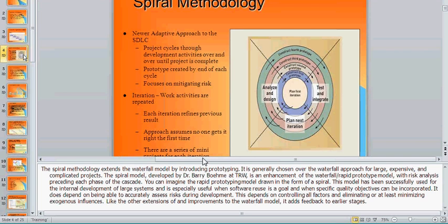Now, another thing to remember in Spiral, that every sub-project that we do is called a release. And every release should be a fully functional prototype. Because if the customer can't use it, then they can't give you feedback on it. Correct? Can you provide feedback on something that you're not able to see, touch, feel, use? No. So every release is a fully functional prototype.